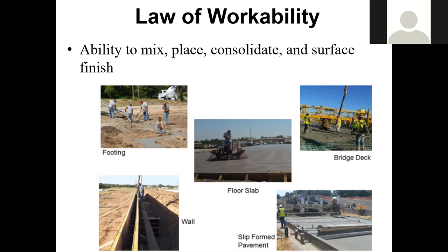And again, a lot of ready mix producers say, okay, look, I'm not going to take this truck to the job with all the water added, because if you do that, you're going to exceed the water cement ratio, or maybe I don't know exactly the workability you want, so I'm going to trim out a little bit of water, so I may not add all the water to the concrete.